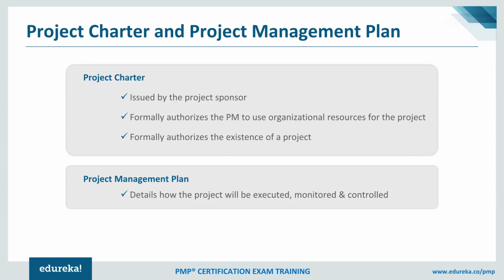So the project charter will typically include your high level scope items, the background, the context behind why this project is initiated, a bit on the business case, etc. Who is a sponsor? Who are some of the key stakeholders? What are the phases that are involved on the project, etc. Some of that information, including what is the acceptance criteria.